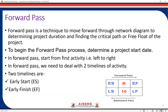To begin with the forward pass process, we determine a project start date. When we are going to start a forward pass process for any project, for any set of activities, we need to first know or assume a project start date. It can be day one or any particular date, but we should have the project start date to begin with this forward pass.